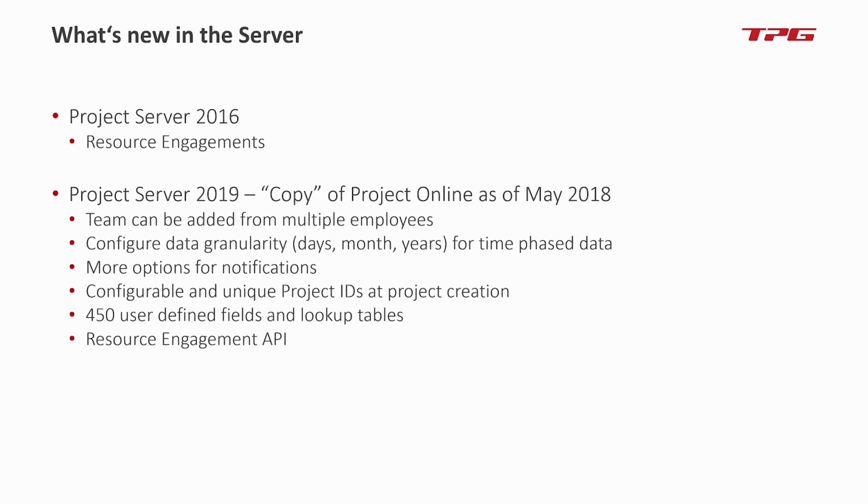It doesn't necessarily have to come from a user, either in Microsoft Project or in Project Server. You can definitely feed some data from external systems into it. Maybe you have another solution that has long-term planning data, maybe an SAP PPM, maybe another top-down demand planning tool that you have in place. And this could definitely feed into this one to see what would be the impact of all these demands and wishes out there in terms of feasibility on the resource side. Excuse me. Again, information on this can be found on the Microsoft pages.